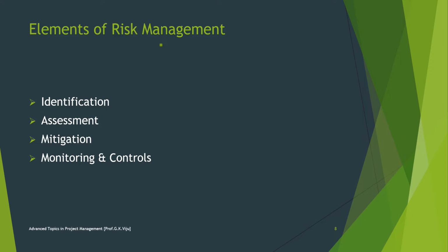Risk management elements: risk identification. It's a more disciplined process involving a checklist of potential risks and evaluating the likelihood that those events might happen on the project. Some companies and industries develop risk checklists based on experience from their past projects. Identifying the sources of risk by category is another method for exploring the potential risk of a project. Some of them are technical, cost, schedule, client, contractual, weather, financial, political, environmental, and people.